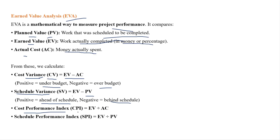Cost Performance Index (CPI) = EV divided by AC. Schedule Performance Index (SPI) = EV divided by PV. If the result is less than 1, it means poor cost efficiency or behind schedule. If positive (greater than 1), you are within budget or ahead of schedule. These indices help measure project performance clearly.